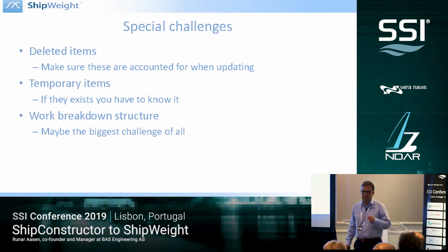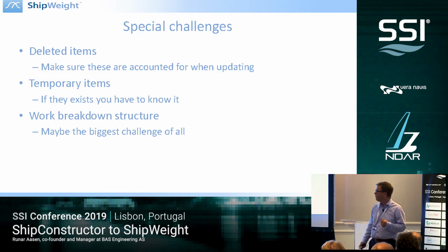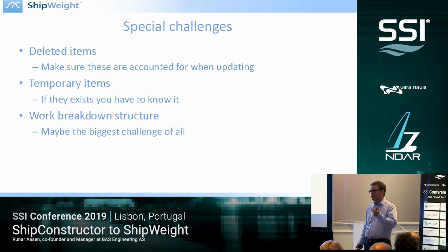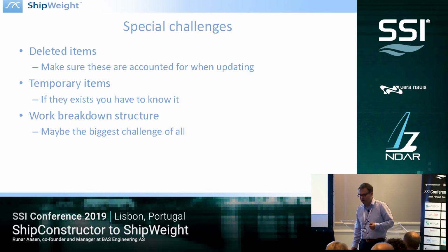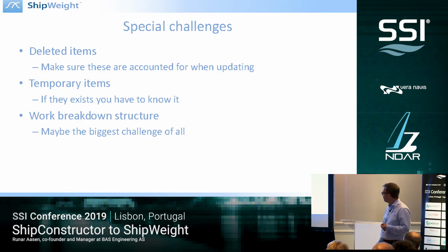Finally, there are some special challenges. One is deleted items. If someone deletes an item in the CAD model, you must make sure that this is also deleted out of the weight model, or else obviously things would stack up and you would pretty soon be overweight. This needs to be accounted for when you're updating.